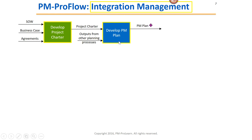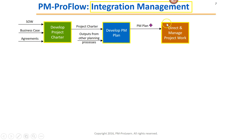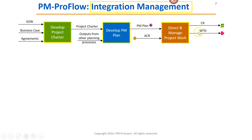The output of Develop PM Plan is the project management plan. Notice there is an on-page connector — a colored shape — that we'll see somewhere else on this page to show you where it's used. The PM Plan is an input to a process called Direct and Manage Project Work, which is highlighted in brown because we're now in the Executing Process Group. We also need approved change requests as an input, shown by an on-page connector. The outputs of Direct and Manage Project Work are Change Requests, Work Performance Data, and Deliverables.